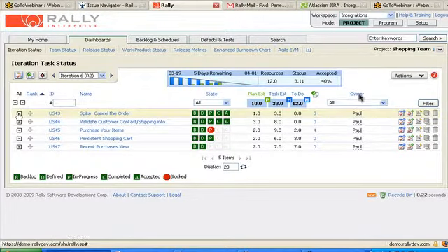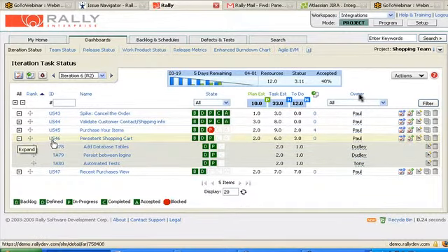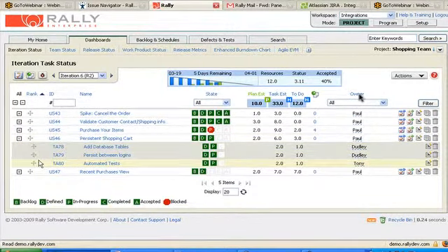If we drill down for each one of these, we can go one level lower on the stories and say each story is composed of tasks. Each task might be assigned a developer, and those have a lower level estimate. So in this way, you can see the user story or the requirement related to the tasks needed to implement it. So there you have something that maybe the product manager or product owner cares more about, and then the tasks that developers care about.